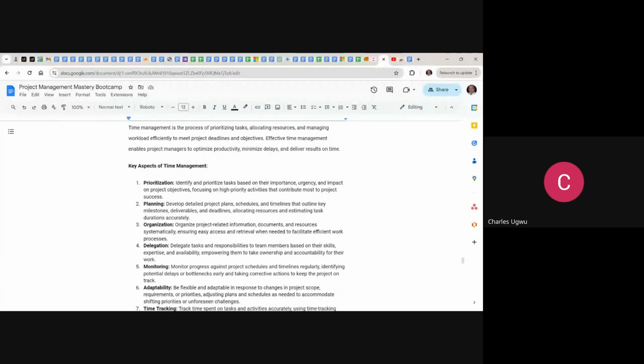It's very, very important. When we'll be discussing Agile or Scrum planning, you see that the product owners' main objective while managing their product backlog is to prioritize the product backlog so that the developers will work on the most prioritized tasks before the less prioritized tasks. When you prioritize it, the developers or whoever is working with them understand the urgency and the impact of the task.